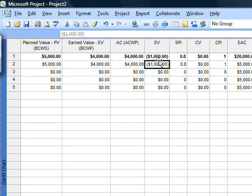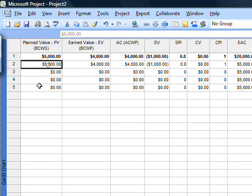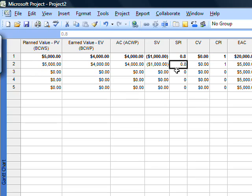Schedule variance is earned value minus planned value. The schedule performance index is 0.8.